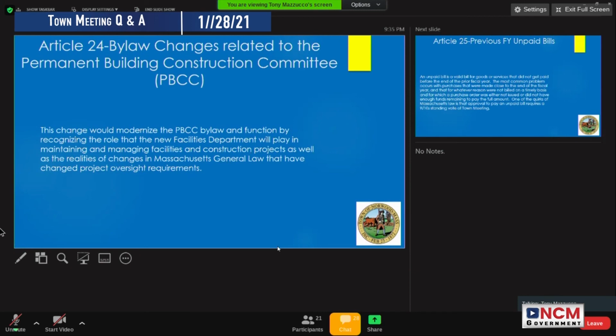The same thing about your second question, with the PBCC being involved, it really depends on looking at what does the house need, and what are we looking at doing? If it's replacing a furnace, and I don't think the furnace there needs to be replaced, I think it's in good shape, it's really a residential furnace, that's not a complicated job. The facilities department would keep an eye on that. If you're talking about tearing down the whole exterior and going through a project where you need an OPM, facilities would definitely be involved in that.